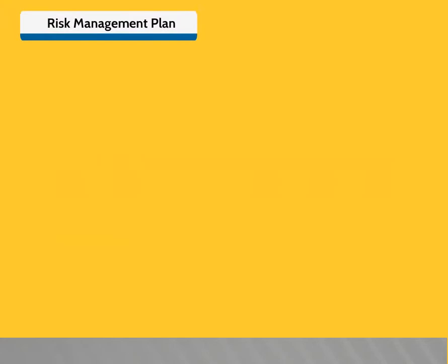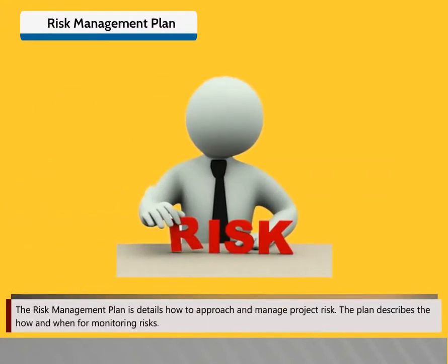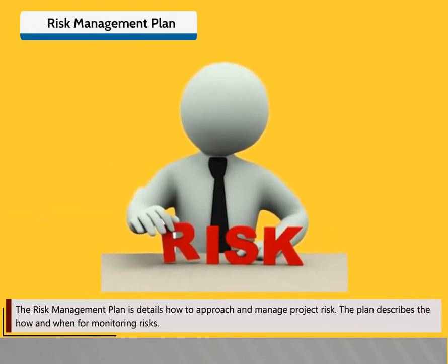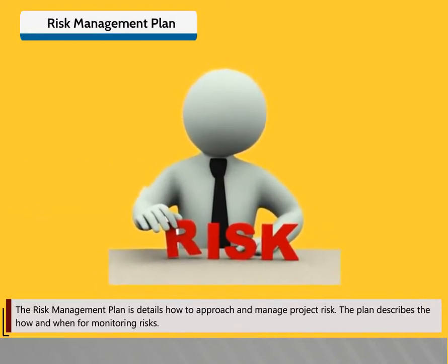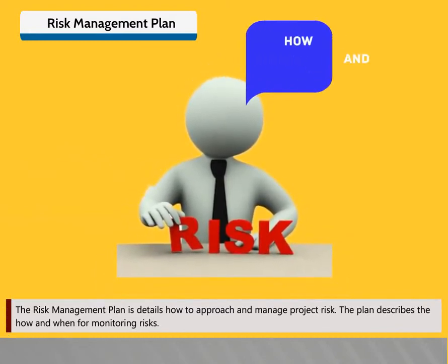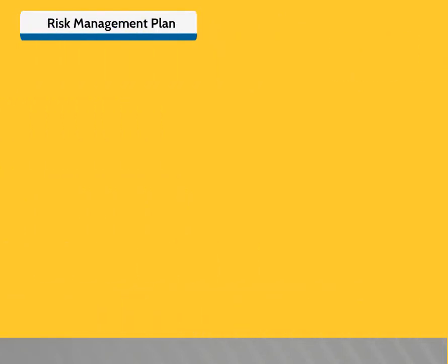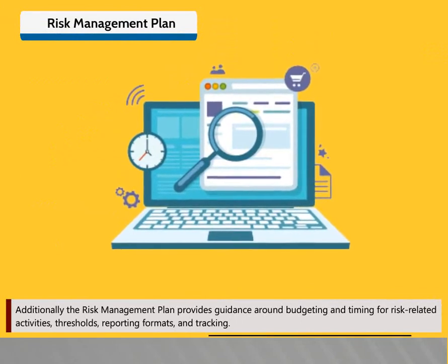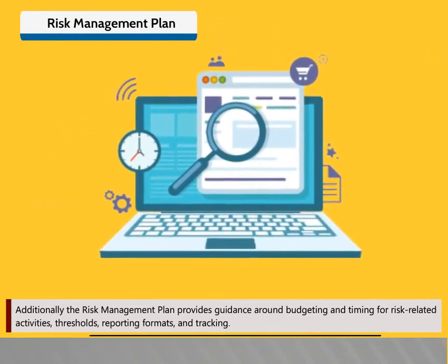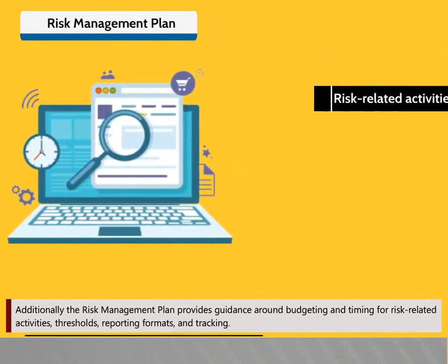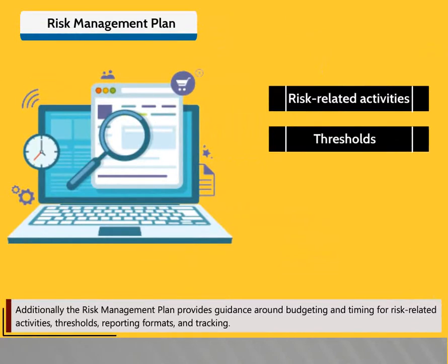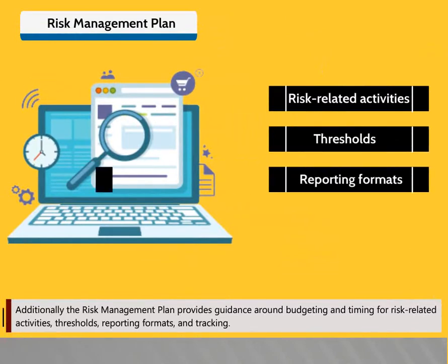Risk management plan. The risk management plan is the details of how to approach and manage project risk. The plan describes the how and when for monitoring risks. Additionally, the risk management plan provides guidance around budgeting and timing for risk-related activities, thresholds, reporting formats, and tracking.